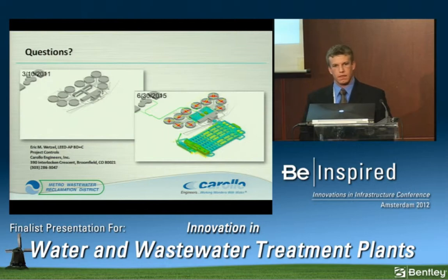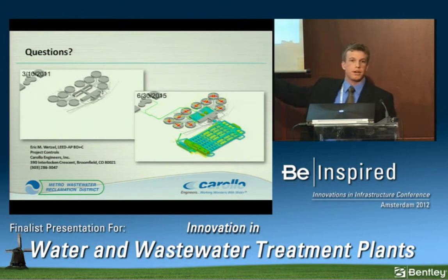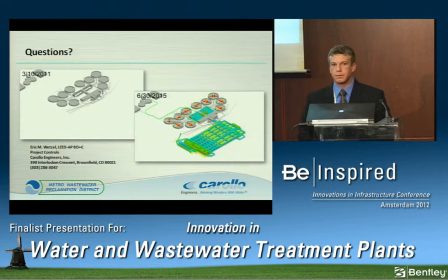And does it make sense to use laser scanning technologies? Yes, and we've utilized laser scanning technologies on the north end of this plant. It's certainly a great tool after everything's built. But we are talking about a lot of new construction here where we weren't able to utilize that, so we had to take our 3D model and modify it because we wanted to use this tool. This project's still going on. We're about 600 days into a 1,500-day project, so at the end we will probably laser scan just to make sure, because there'll be conduit runs that weren't modeled, things like that. We do have cable tray and all that, but there is still smaller bore piping that's not in the model itself, so we will utilize laser scanning.